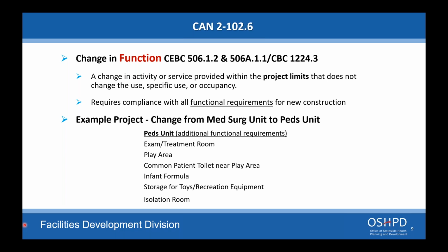Okay, what is required when you do a change in function? What the code says, it requires compliance with all functional requirements for new construction. It doesn't say it has to be brought up to full building code. It just has to meet the functional requirements of that section. So let's look at an example of that.